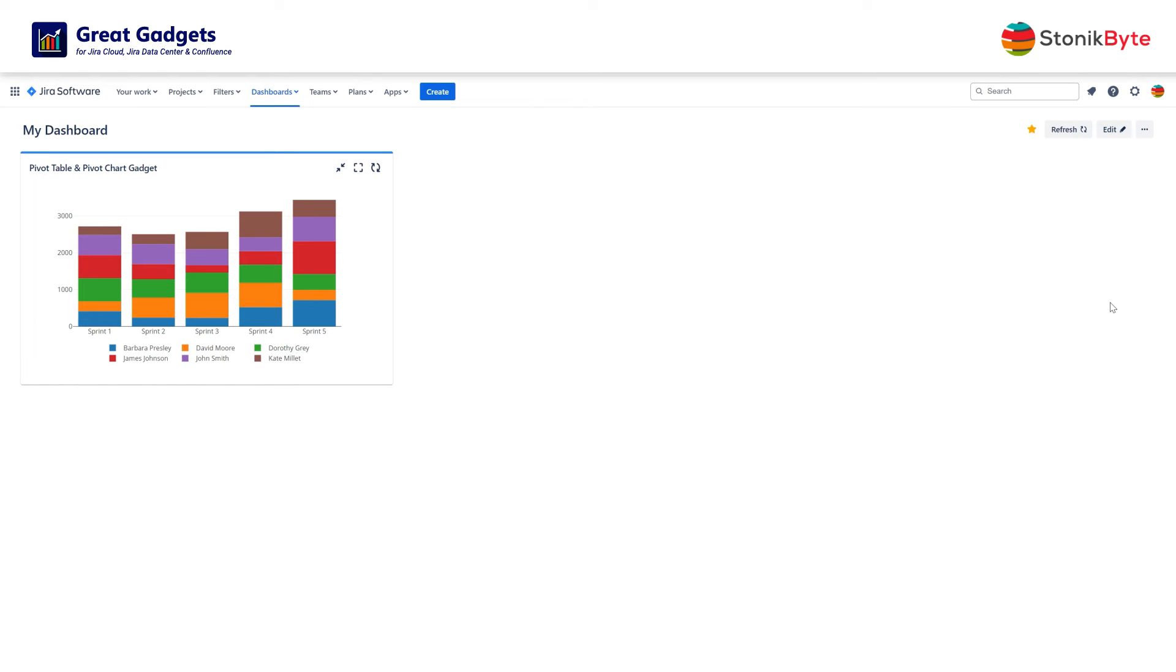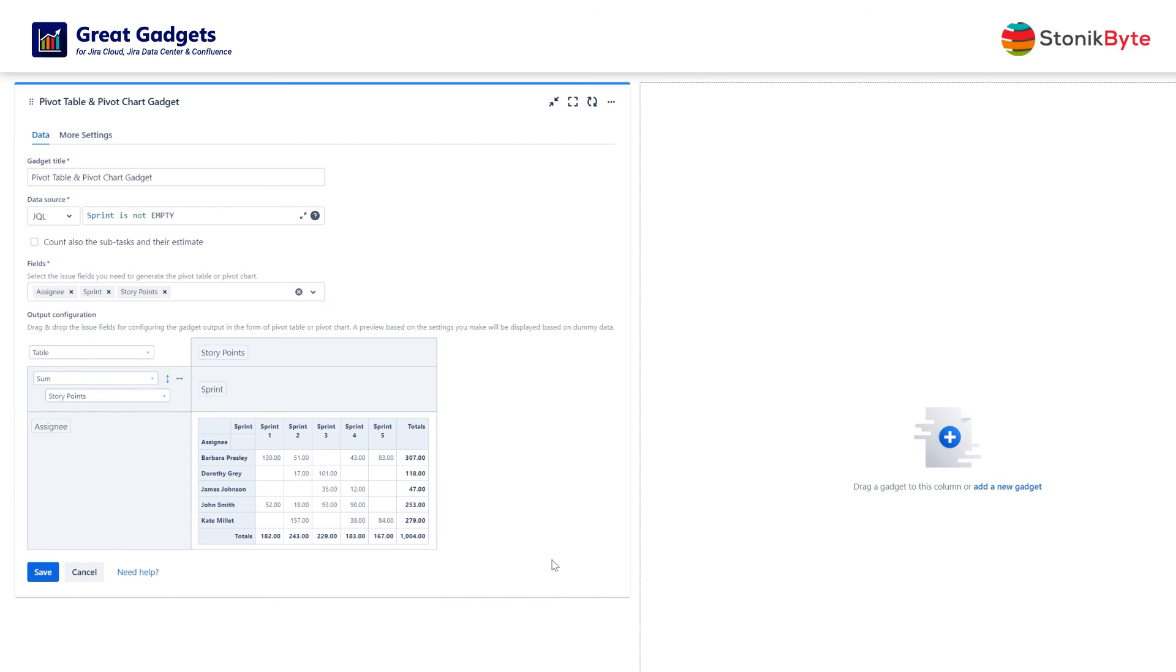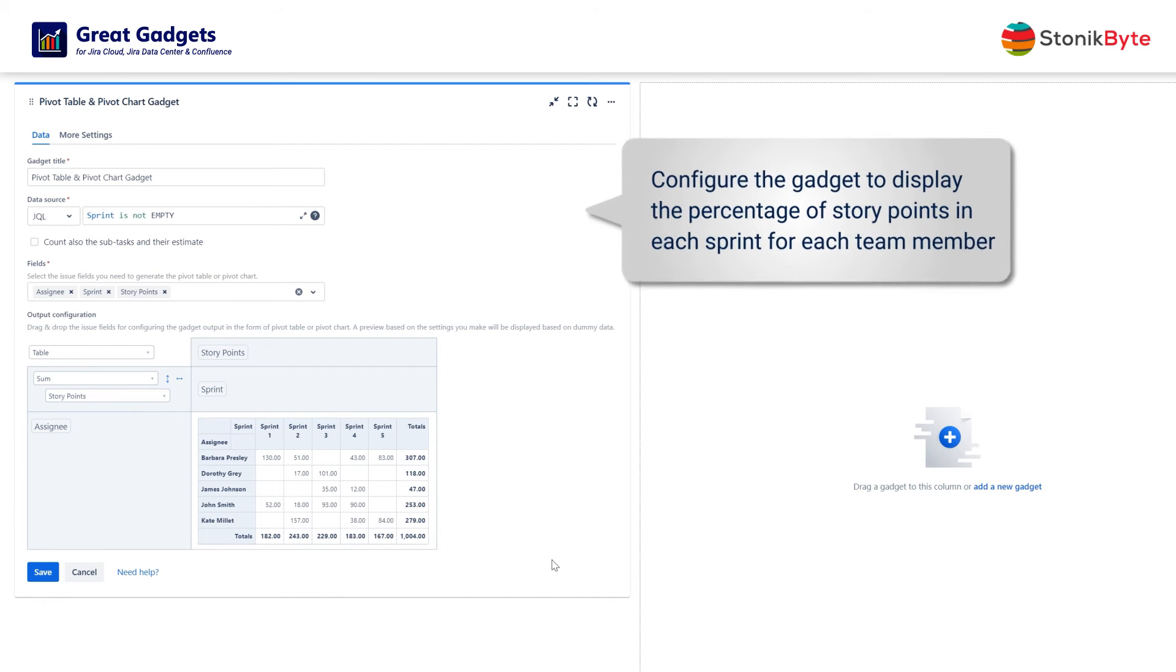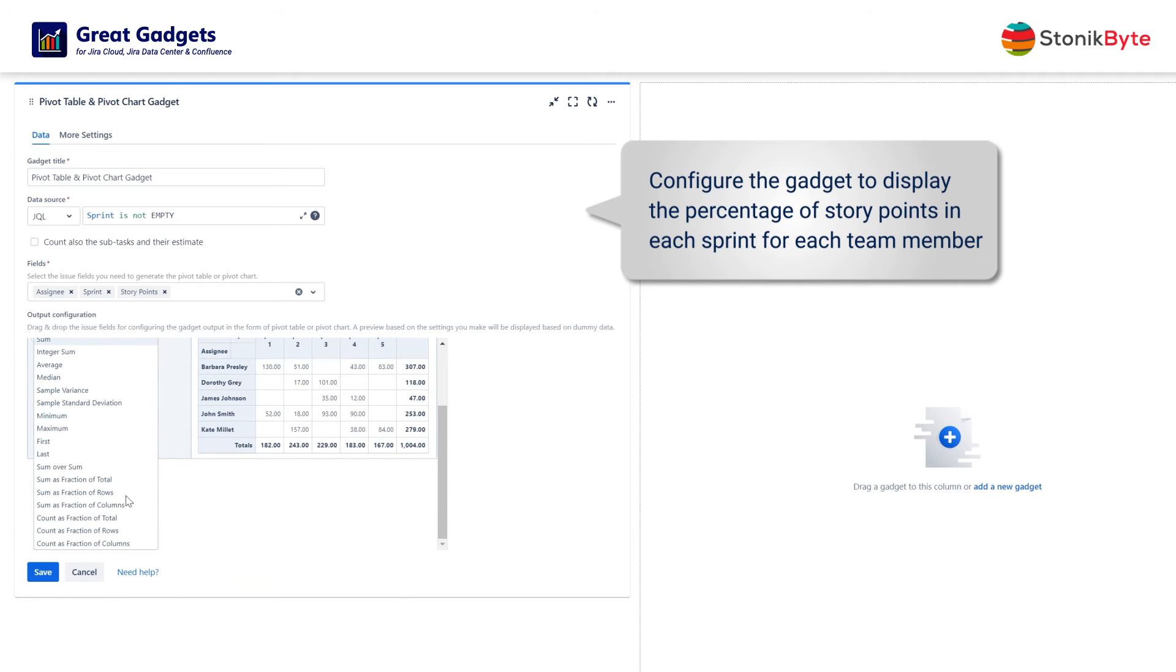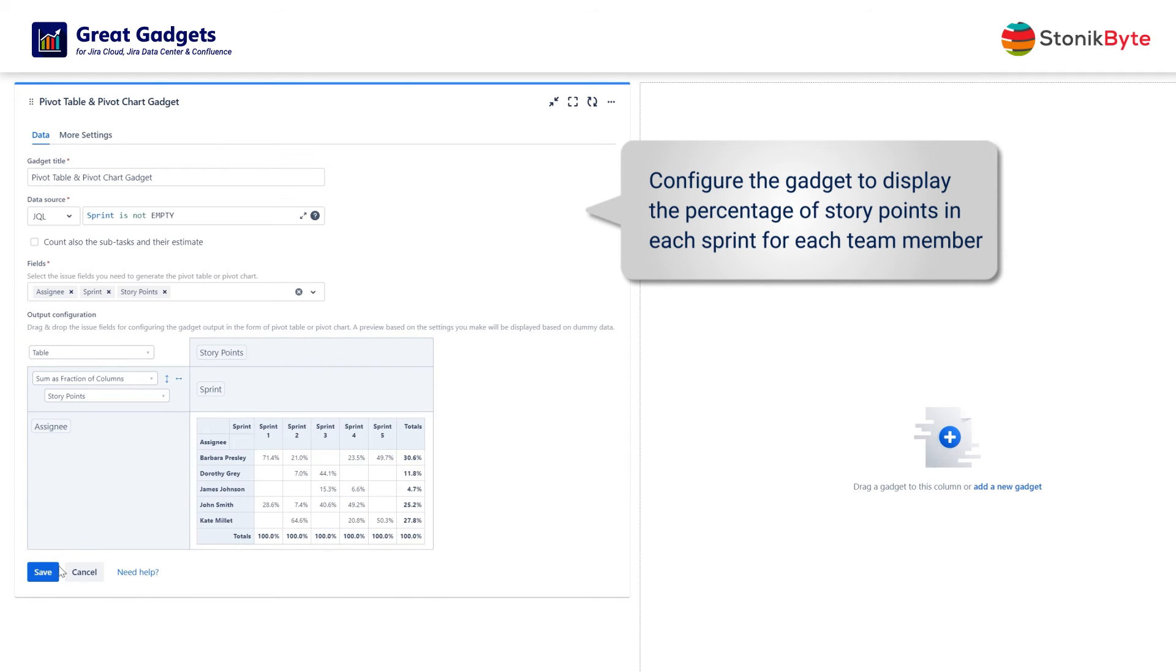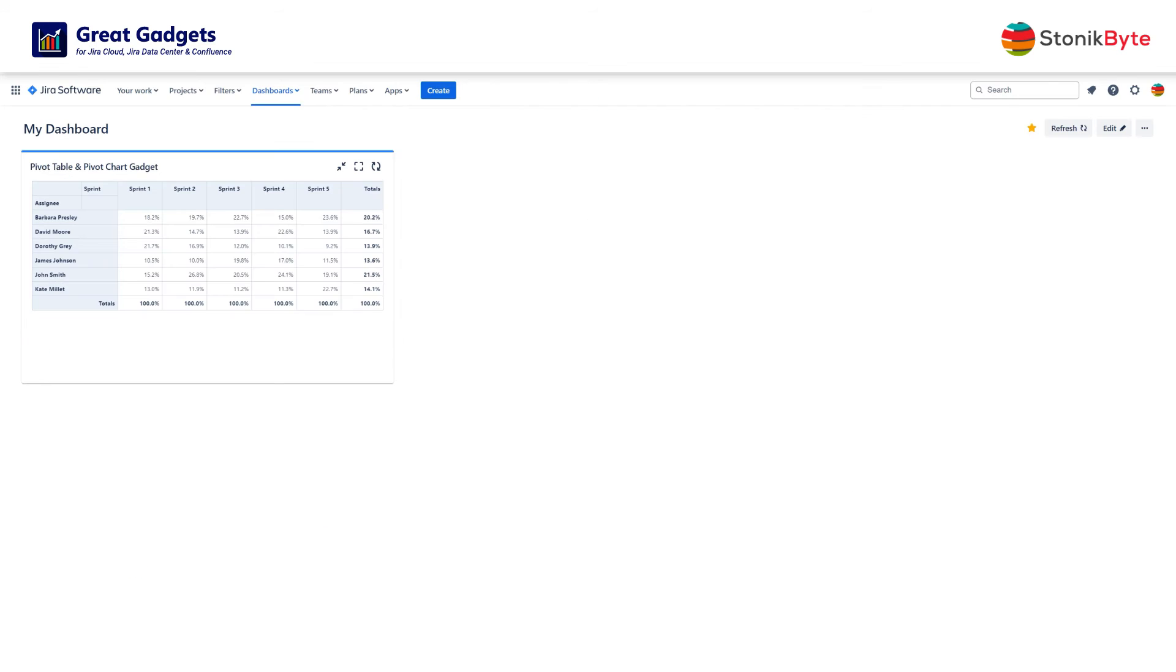But what if instead of story points, you want this statistic based on the percentage of story points in each sprint for each team member? This is actually very easy to do. Just set the calculation method to sum as fraction of columns. And the table now displays percentages of the total in each column.